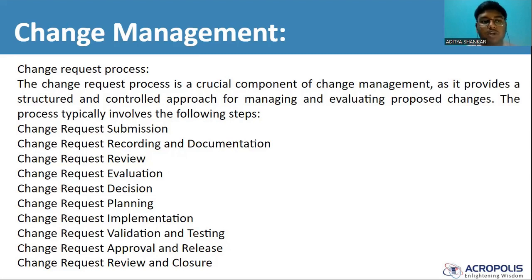Then it is reviewed. That comes under change request review. Then under change request evaluation, the document is evaluated, what changes are to be applied. Then is decision, what changes are to be applied. Planning, how the changes are to be applied. Implementation is the process under which the changes are actually implemented in the software code.